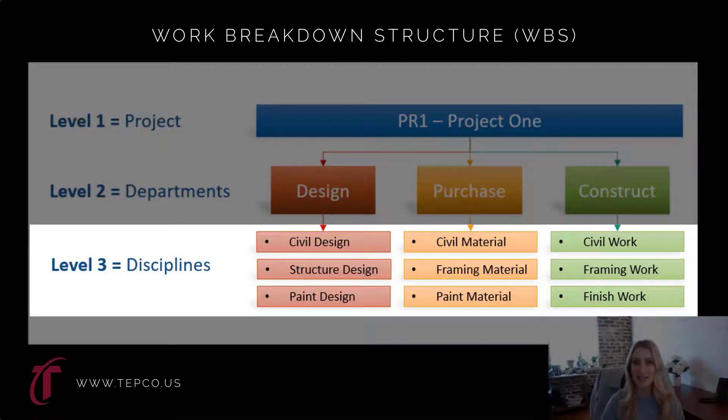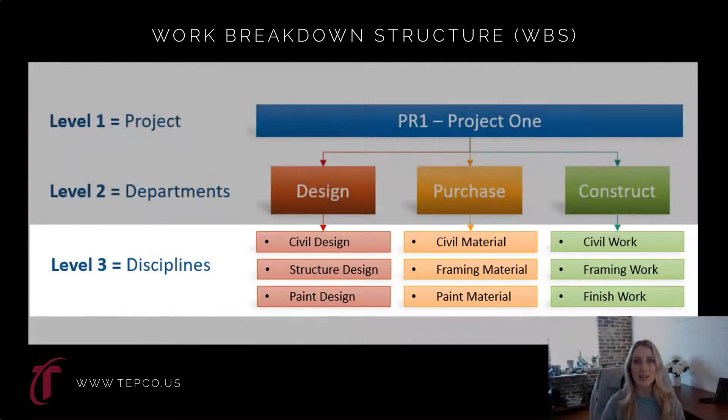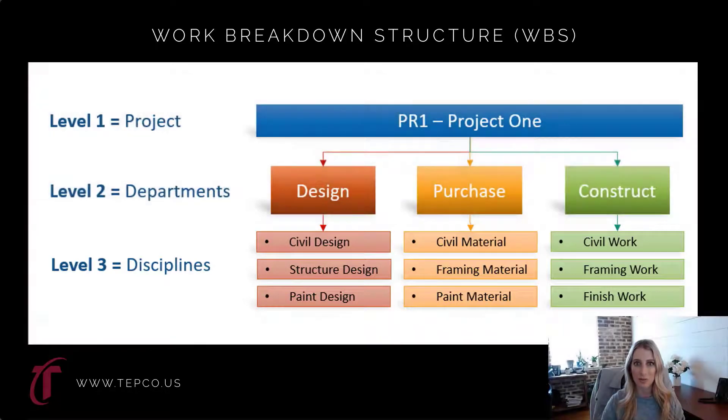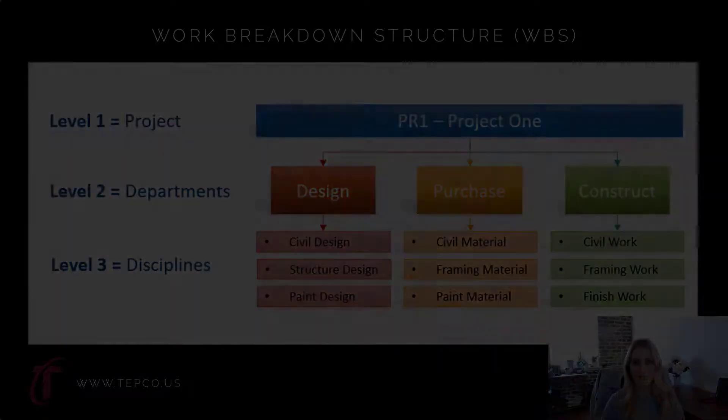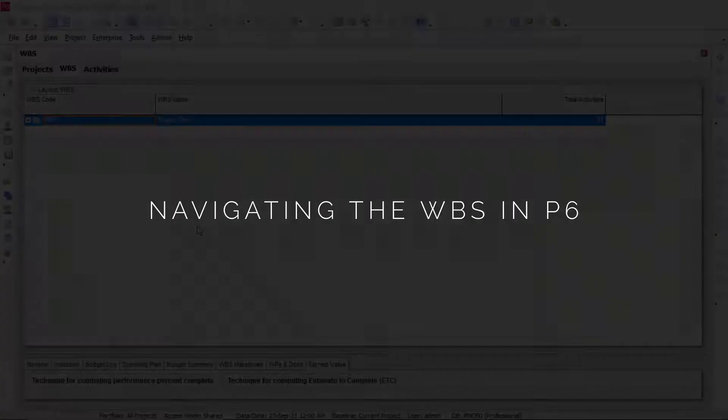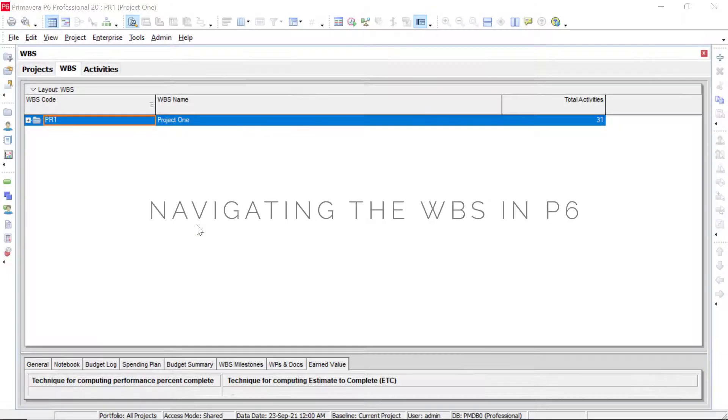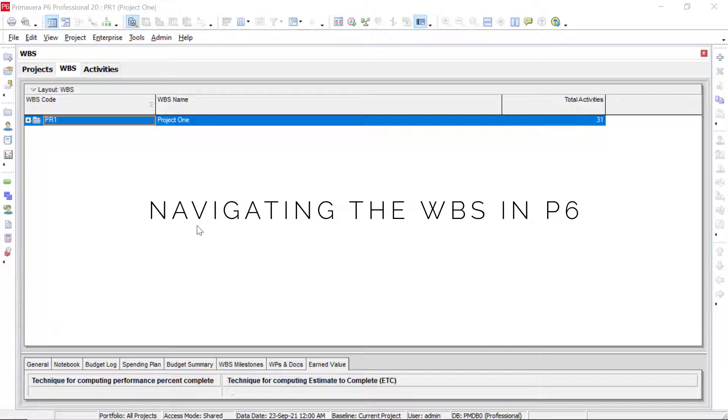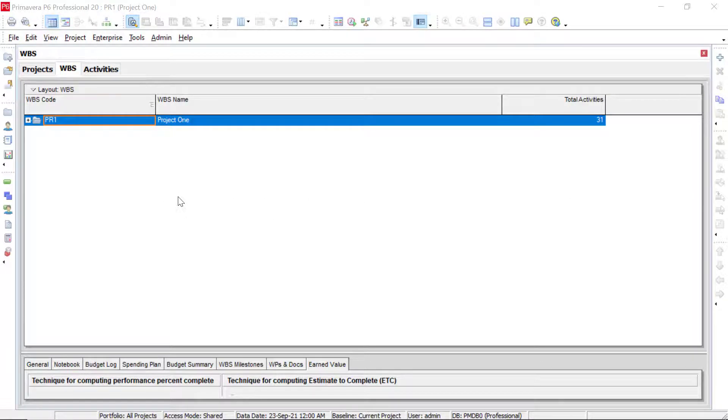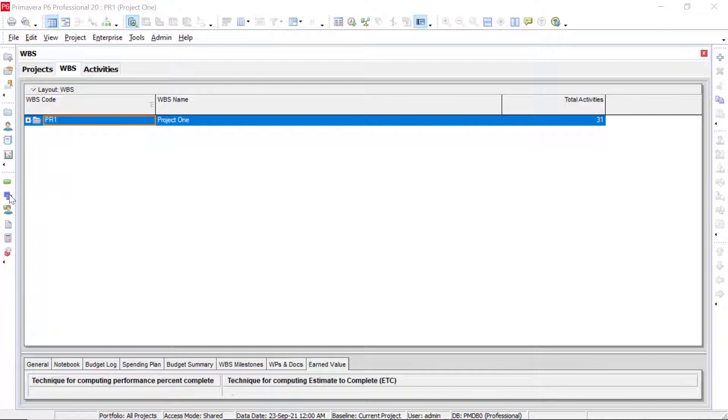Now, let's take a look at navigating through the work breakdown structure. For this tutorial video, we're going to be looking at navigating in our WBS in P6. In order to get to the WBS, after we open our project, we can just click on this little icon right here to open this screen.